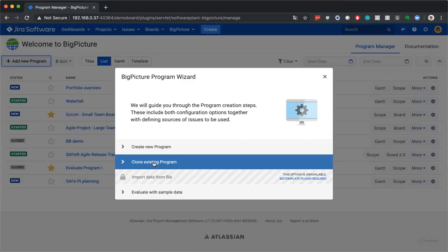The business idea behind it is that whenever you have a template project, which you will repeat multiple times in the future, then the preferred way to do it is to create a program based on it, and clone the program. This will effectively bulk clone all of the tickets for you and paste them into a new project.